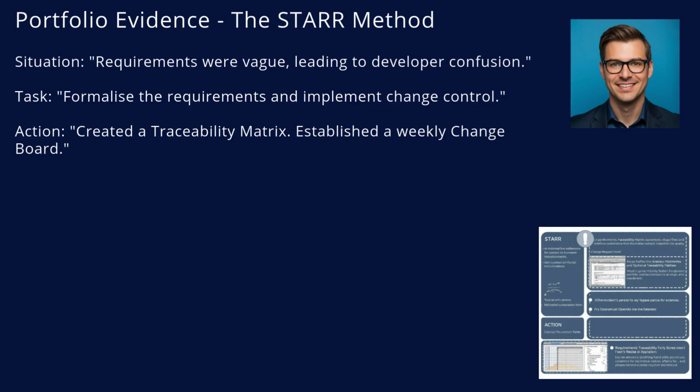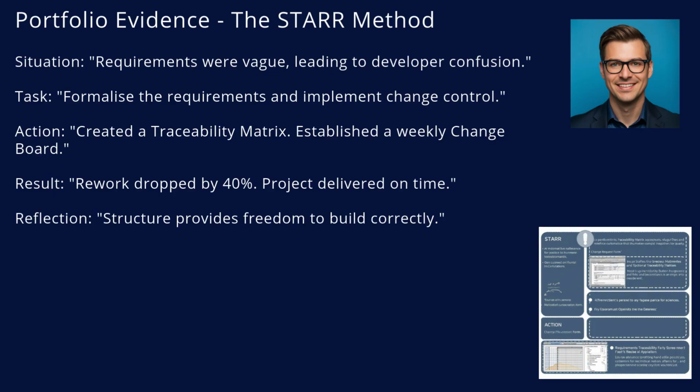I also established a weekly change board meeting where any new requests were formally reviewed for impact before being added to the sprint. Result: rework dropped by 40% within 2 weeks. The team had clarity, and the project was delivered on the original deadline. Reflection: I learned that structure doesn't stifle creativity, it provides the freedom to build correctly by removing ambiguity.